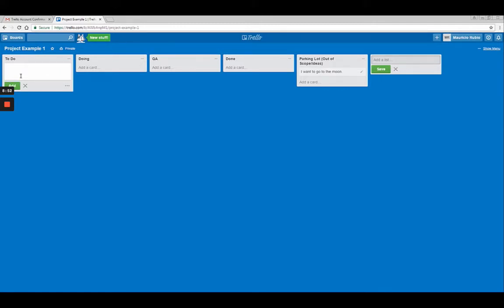So in general, you're going to notice that people that work in Agile don't really follow the full template of a user story, and they just write it down as a task. And what I normally recommend people working on projects is that they keep it really short, because people don't want to read these long things, and that they just put it in verb tense. So you should start with a verb, because it's actually an action, right? We want to control what people are doing or what we are doing ourselves. So it should start with a verb, because a verb denotes action, right? So let's say here we were talking about a schedule. So, create project schedule, right?